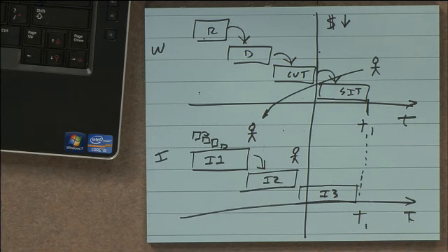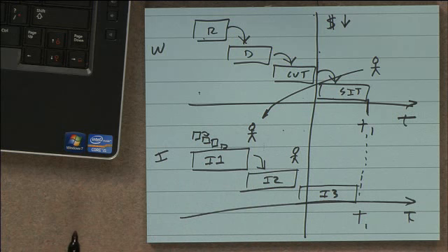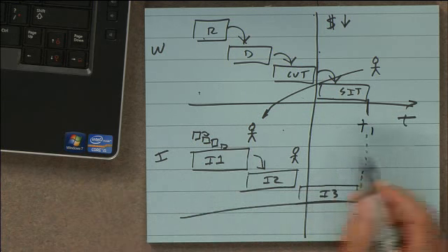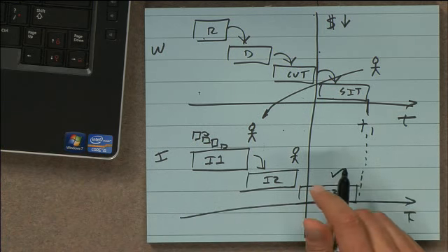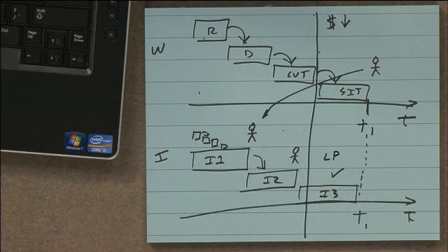Now, if I was planning my increments and prioritizing my requirements properly, which we're going to get to, requirements prioritization, the way I would probably plan it is that increment 3 would be my low priority requirements, the nice to haves, not terribly important. I'll push those off till last. Why do them early? Do the important stuff early.